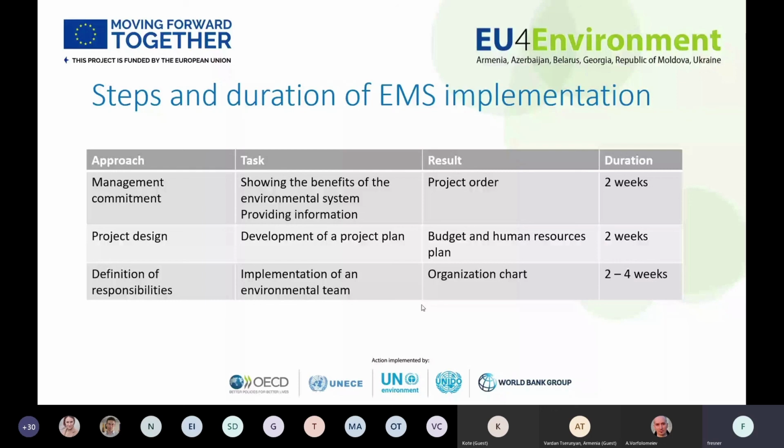This first stage of getting management commitment, according to our experience, takes around 2 weeks. Although I have to admit this is the minimum duration. Just talking to people, formulating a proposal, presenting the proposal, getting buy-in.